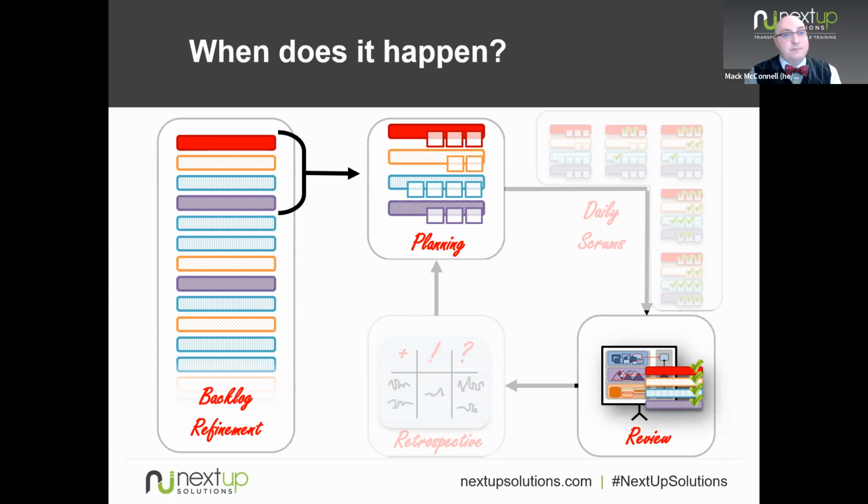At the start of every sprint, the first two conversations, the why and the what, where the team picks the sprint goal, and then the team decides which backlog items will get done in the sprint to meet that goal. We are committing to advancing the current state of the product by building those things and meeting that goal. Then the team goes off and does that work, and we're going to come back together during the sprint review to figure out what exactly happened, how did the product change.